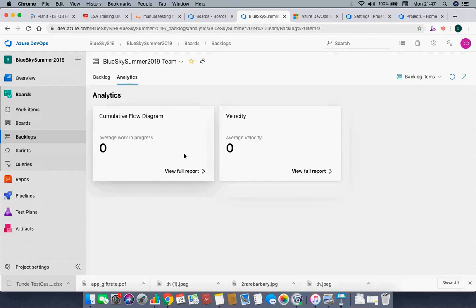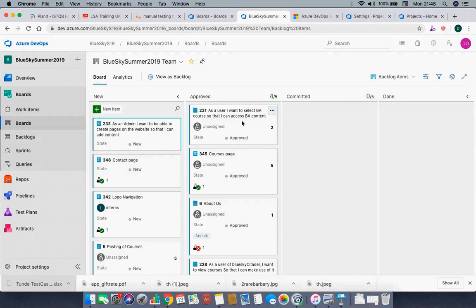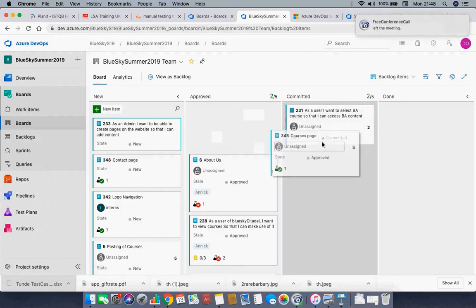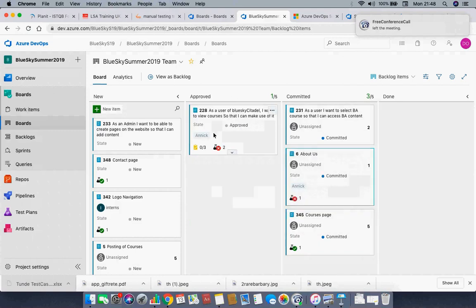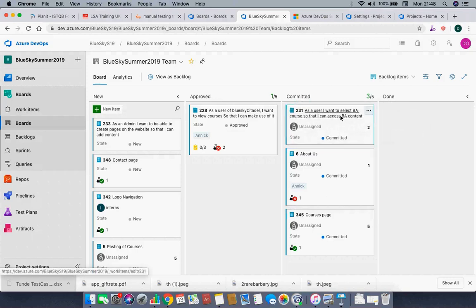All this we're going to be using during the internship. You're going to have like 3 months of using this particular tool, and of course, by that time, you will see metrics and everything. Now your sprint backlog, like I said, we've used the backlog and we'll move it as a board. Other companies use the backlog as it is right now. Once they've done the prep or the planning, they move this particular story into committed. Basically, they've got 4 items in planned, but now they are committing to do 3. Then once it's done, they put them in done.